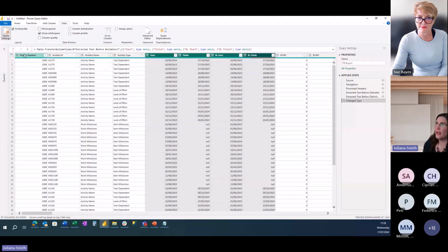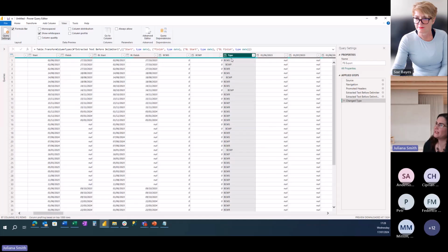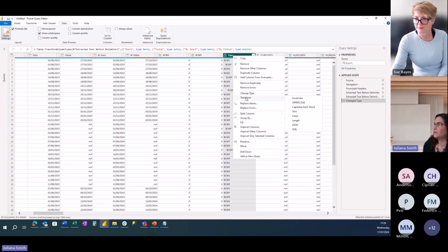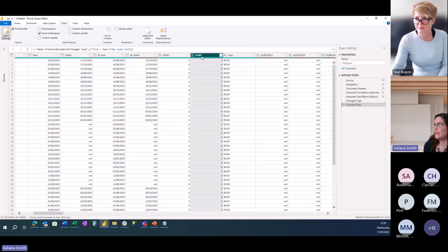So something else that I have to do here is I'm going to fix this. I don't want to have any space. So in Power BI, you can just go to transform and trim. That's something you can do quickly. Now, these two columns here, I don't really need them because they will have totals of the budget cost of work scheduled and work performed. And these totals will be calculated based on the other columns. So they are a bit redundant, so I'm going to remove them.